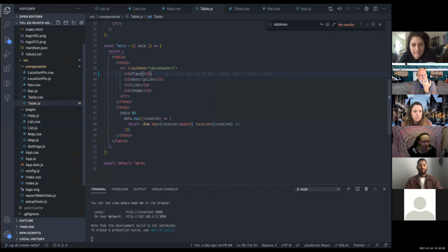And then user types. We don't really have this in our app, but if you had a CMS, like I was talking about, you might have writers and editors as two different users. The writers need a good authoring experience. The editors need a workflow, like an approval workflow. So you might be able to split along those user types, not try to do everything at once. The level of the goal, so summary goals versus user goals. User goals being something that a user wants to do. Summary goals being maybe higher level goals for the app.